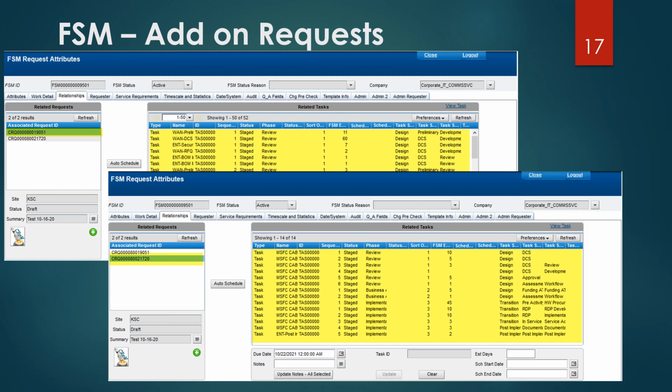That's a good question, because in this scenario that I'm laying out here, the first change request needs this work from cable plant to be able to complete their change request. So you would expect the add-on change request for the cable plant to go do their work and complete. It'll go all the way to completed on that change request before you have activated the additional tasks beyond that point on the first change request. And so, yeah, one can finish before the other. One can get canceled. You know, if they got over there, well, you know what?